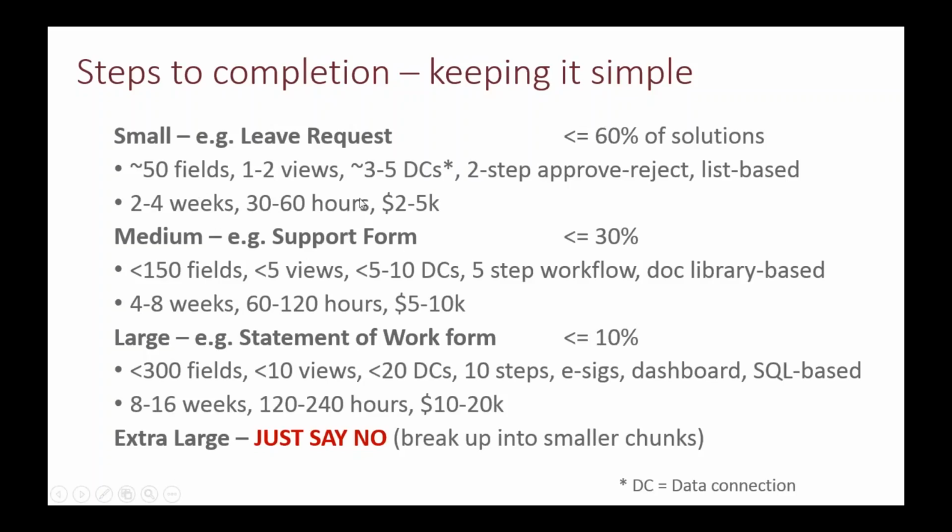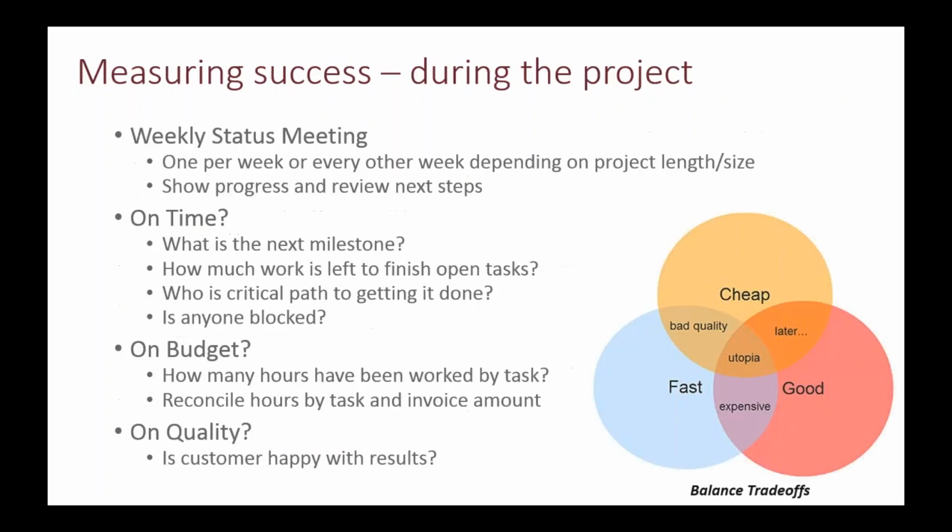When we run a project that's small, it's 30 to 60 hours depending on the resource, 2 to 5K. When we do a medium project, it's a little bit longer and a little bit more expensive. Large projects, same thing. But they all tend to be within 8 to 16 weeks. We have 1 or 2 projects that will span 2 or 3 quarters, but it's very rare.